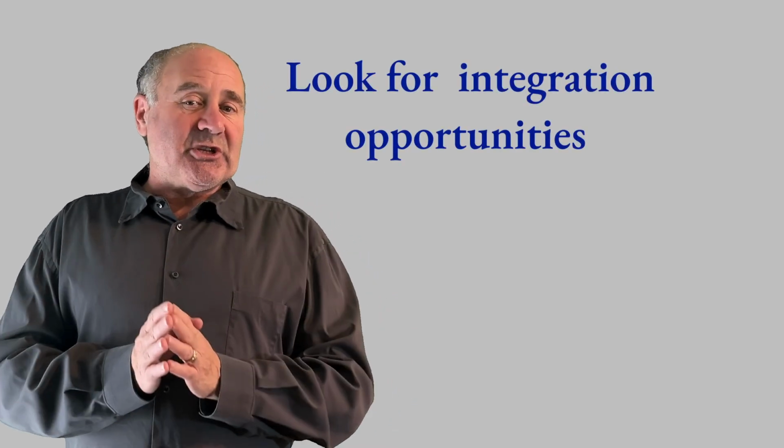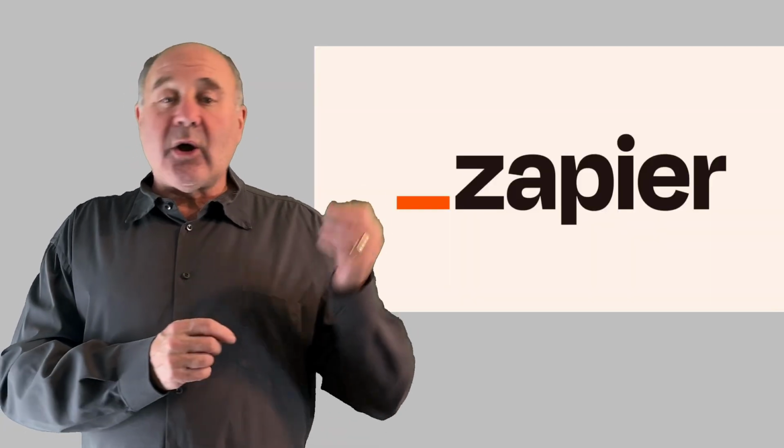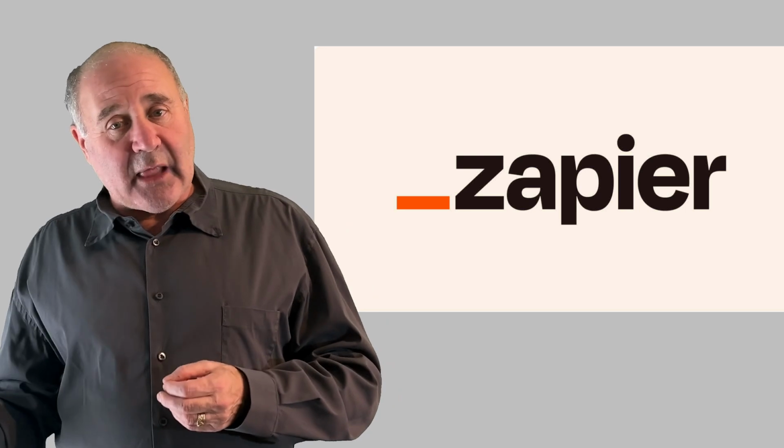If you use other business platforms for onboarding customers, payroll, financial reporting, or other functions, look for integrations that will increase your efficiency. For instance, when a customer is onboarded, that might trigger the creation of certain tasks based on information in your customer relations management system. Or hours logged in your PM platform might roll up to your accounting system to create an invoice for your time and materials clients. Even if there isn't native integration, many platforms enable interactions through Zapier, where an event on one platform triggers an action on another platform.